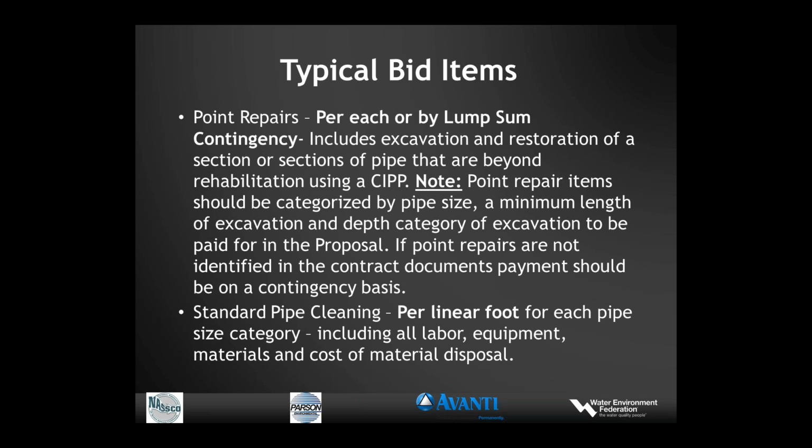Needs to be spelled out very efficiently on how these are going to be paid, because we're protecting two different groups here. We're protecting the owner from overcharges and the contractor from excessive costs. And either way, it can go either way, so it should be laid out in the bid items.